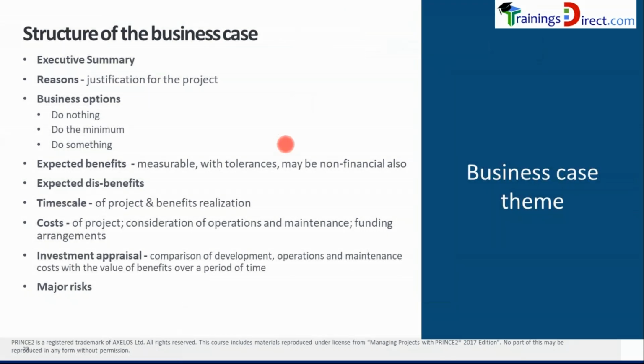For the practitioner exam, it is important to understand the structure of a few management products out of the 26 total in PRINCE2. In reality, a PRINCE2 project may have more than 26 management products or fewer, because of tailoring. Some management products may be combined and some may be split into several management products, and new management products may be added depending on organizational needs.